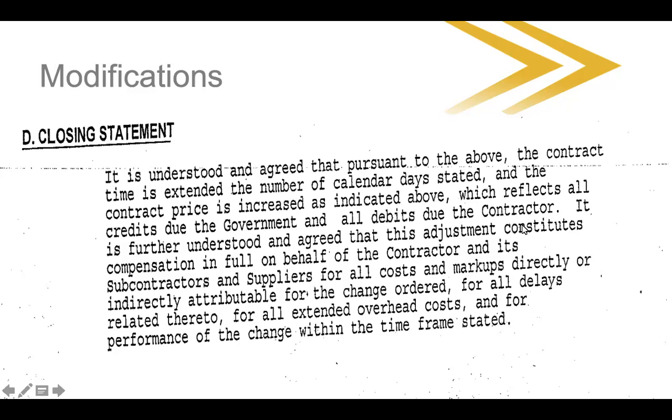In other words, I'm getting whatever I got in this mod, and I will never ask for additional days or additional dollars ever again. Speak now or forever hold your peace. So if you sign a mod with this type of language in it, you've just waived your right to go after any more dollars or any more days associated with whatever the subject of the mod is.